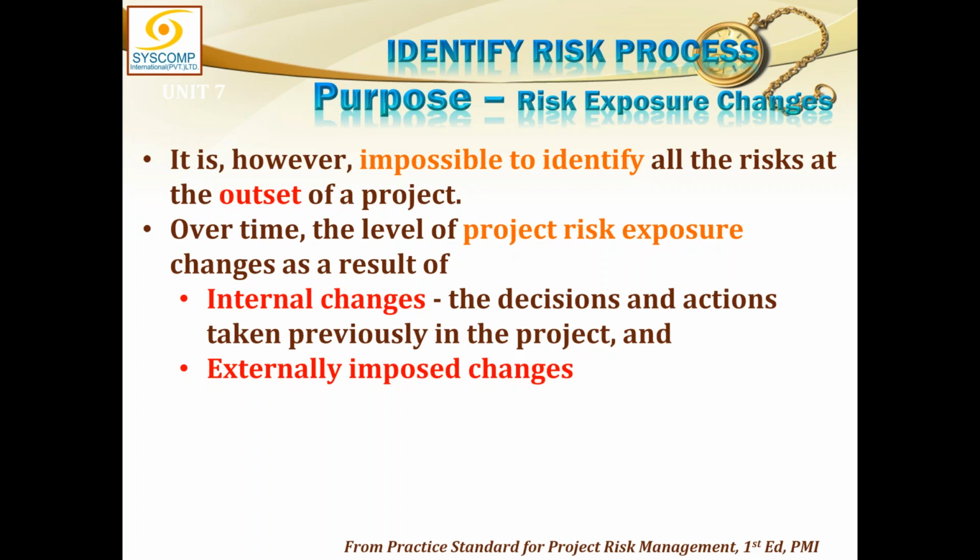Naturally, over time, as we proceed in the life of the project, we will get to know of changing circumstances and progressive elaboration, and due to that, new risks will arise and we will be able to identify and recognize them. The level of risk exposure will change over time. Internal changes will also bring certain decisions, and actions taken previously in the project may bring to light new risks related to them, or even unseen risks which could be highlighted with the time that passes. Then there could be some externally imposed changes which may also cause us to identify more risks in future. Therefore, we will keep identifying risk throughout the life of the project, but we start this process of identification as soon as possible.